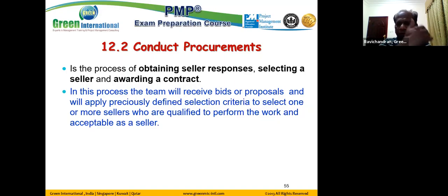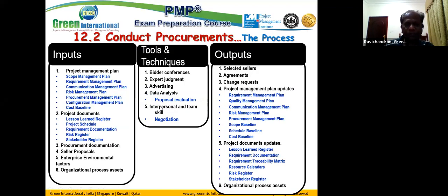Then you call the sellers to come and make a presentation. If the presentation goes well, we may move into negotiation. Then upon negotiation, we will select a particular seller and award the contract to them. This is the conduct procurement process. Let's look at the process.